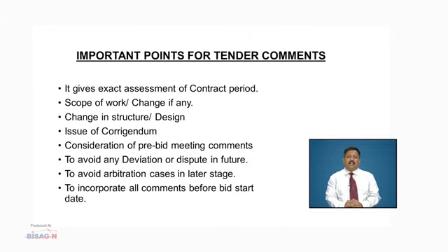After undergoing the tender presentation and listening to the tender comments and having a discussion thereon, we can assess the exact period of the contract for its execution. Changes, if any, are made in this stage only. Revised item approval, if required, is initiated in this stage only. It also gives us a chance to revisit the scope of work, and changes, if any, can be made at this stage. Also, the change in design and the structure, if needed, is incorporated in this stage.